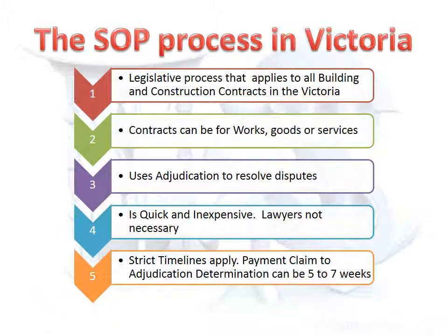Security of payment is a process enshrined in legislation to assist service and product suppliers in the building and construction industry, such as builders and tradespeople, to quickly and easily get paid for work done without having to resort to expensive litigation and legal costs. The security of payment process is only applicable to commercial builds and owner builders, except in Tasmania, where the builder, service or goods supplier can use it to recover payment in relation to residential and domestic buildings.